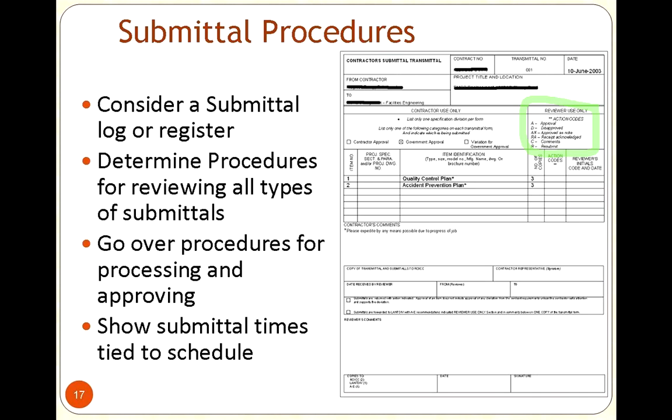So essentially, we would have the contractors fill out this form, and then the quality control manager would take a look at it and give his thoughts, his viewpoints, his opinion. And if we needed to return it, we could certainly return it. But this was part of our procedure for reviewing any documents that came in. And we also kept a log of a lot of these submissions that happened along the way.